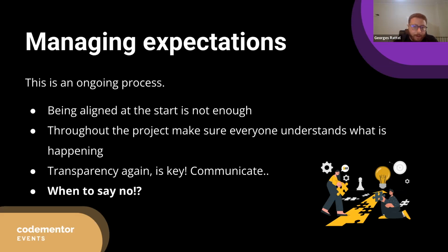And that's why it's also important to understand when to say no. And it's not only when to say no to a project, it's also when to say no to a certain feedback or a change request, because throughout the development life cycle, and as you're building the project, sometimes the clients suddenly realize something from the market and they would like to add a certain feature, for example. And if you keep saying yes, you're basically trying to please the client and making them happy and proving that you're a good developer. But at the end of the day, this might cause a delay on the project.